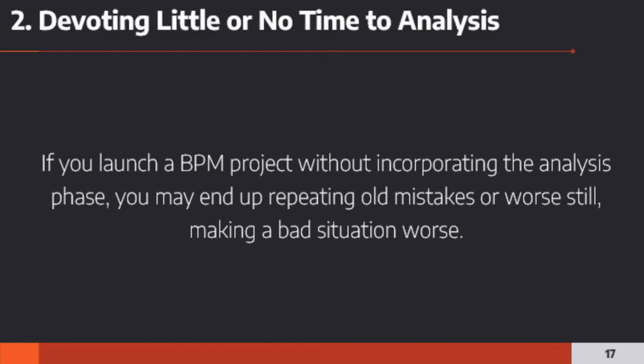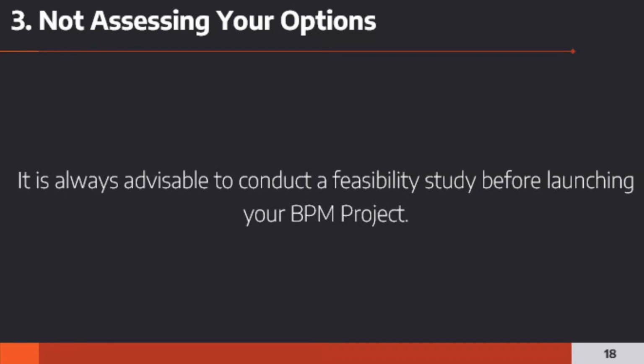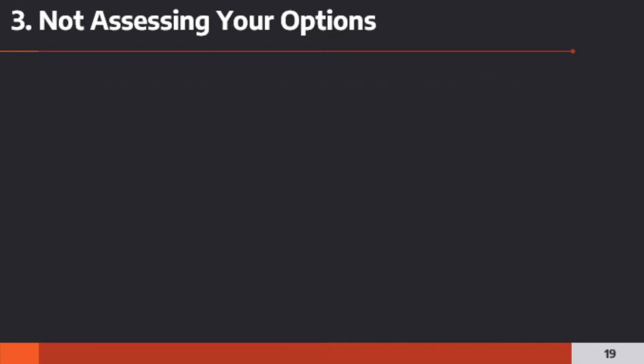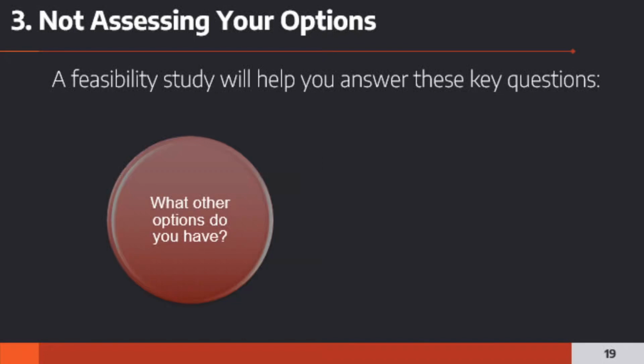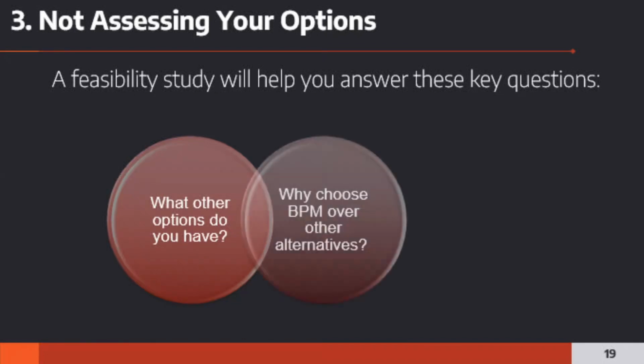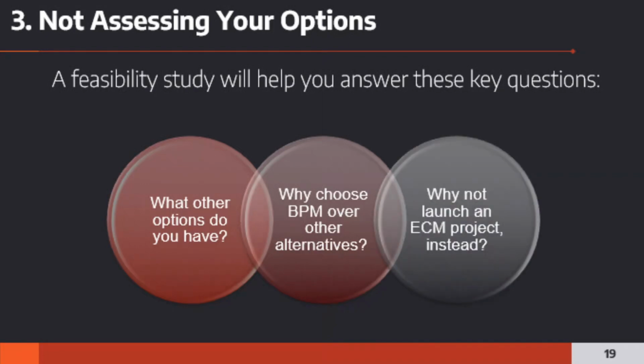Okay? The third reason why a BPM project may fail is that you're not assessing your options. It is always advisable to conduct a feasibility study before launching your BPM project. Why is that so? Because a feasibility study will help you answer these key questions. Number 1, what other options do you have? Number 2, why choose BPM over other alternatives? And number 3, why not launch an ECM project instead?